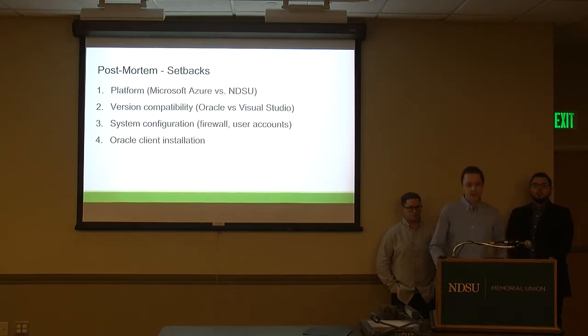As far as particular setbacks go, the first one we could talk about is choosing the particular platform for hosting our ETL lab. We'd originally anticipated using Microsoft Azure and started working using that software, but quickly realized that it would have been much better to host it at NDSU, so that actually required us to rebuild the whole system there.